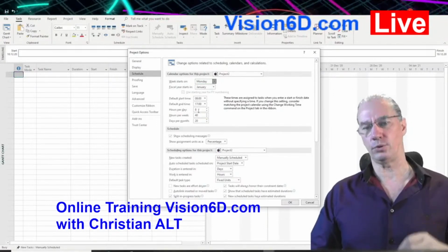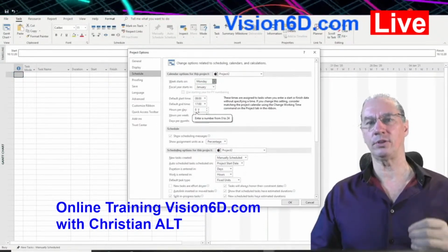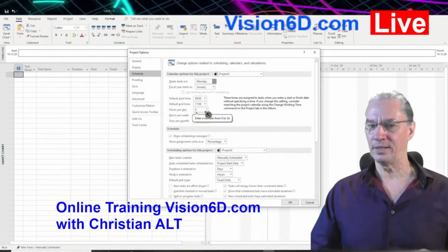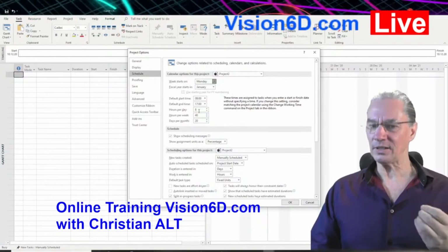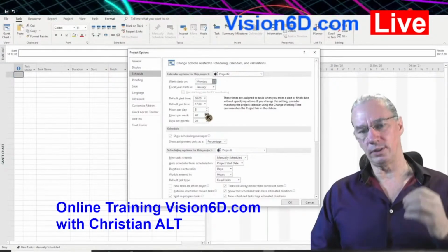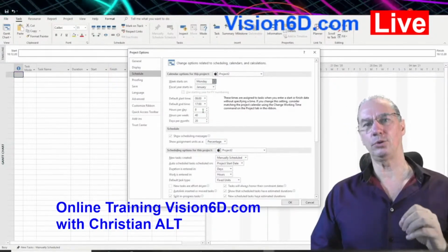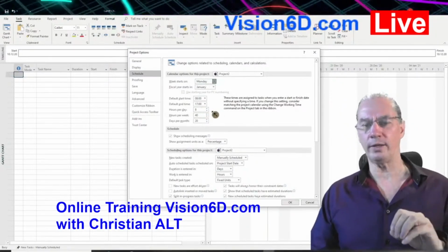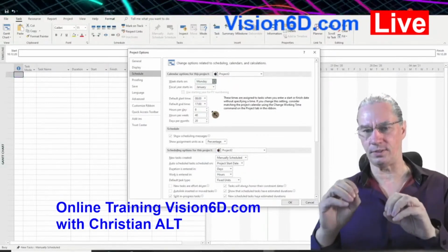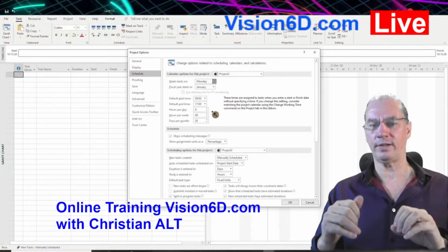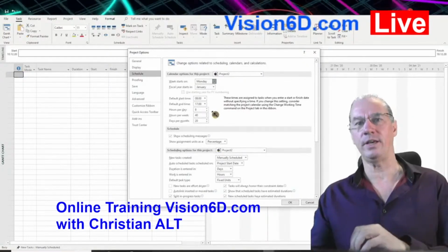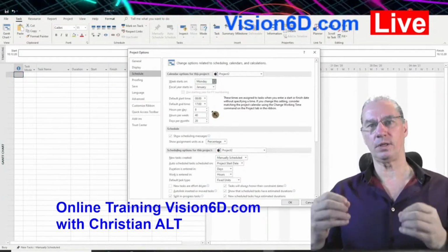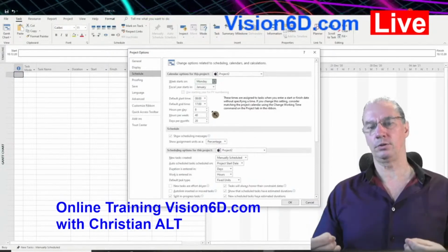If you enter 1 day and your definition is 7.5 hours, for Microsoft Project it will be 7.5 hours. Later on, if you decide to come back, it will still consider that you were defining 7.5 hours, and you will find those strange things in your diagrams and duration where 1 day is in fact 0.88 days. These are rests from those option changes. And once again, it's really difficult to change them.